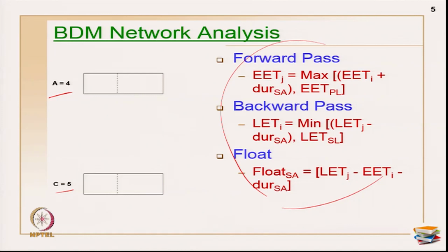Now we are starting with the links. The first link is coming from A to C, and the linkage value is given as 2 to 1, which implies the subactivity A1 takes 2 days of time and then it is releasing this, and the subactivity C1 is taking 1 day of time to receive my link from A. Then there is a next link from here. This is actually a truncated portion.